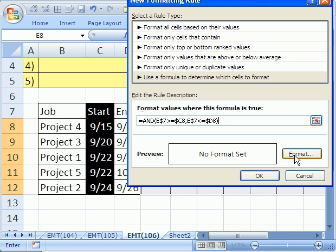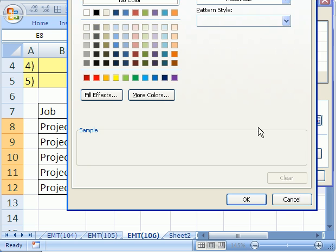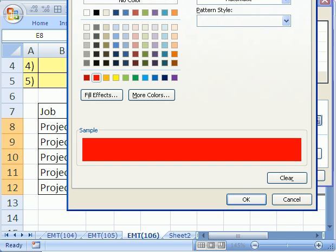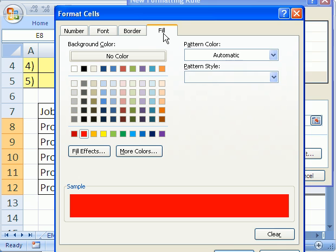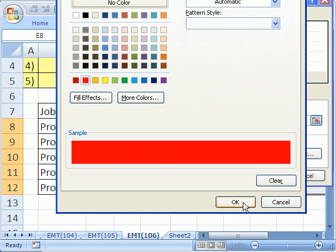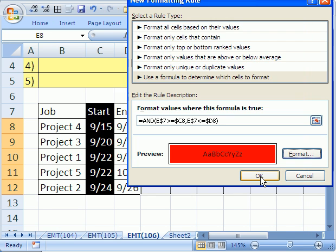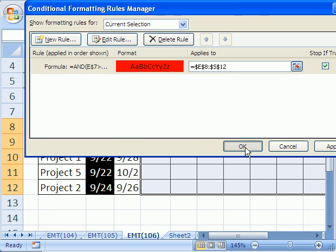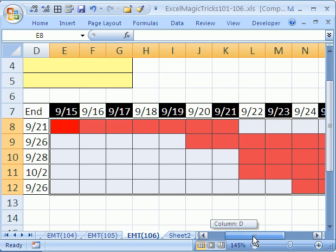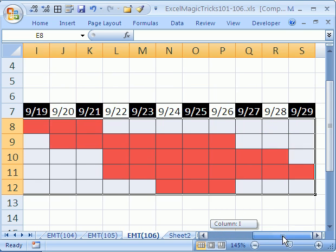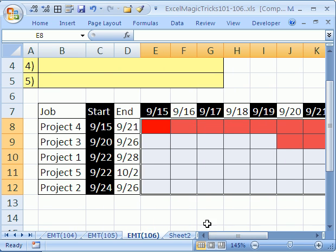I'm going to click Format, and I'm going to say Red. Notice this says Fill in 2007. In 2003, it says Patterns. And then click OK, and then click OK. And sure enough, we have our little Gantt chart. If we scroll over here, we can see only the cells where the dates meet the criteria up here are highlighted. So that's how to do it with dates instead of years.